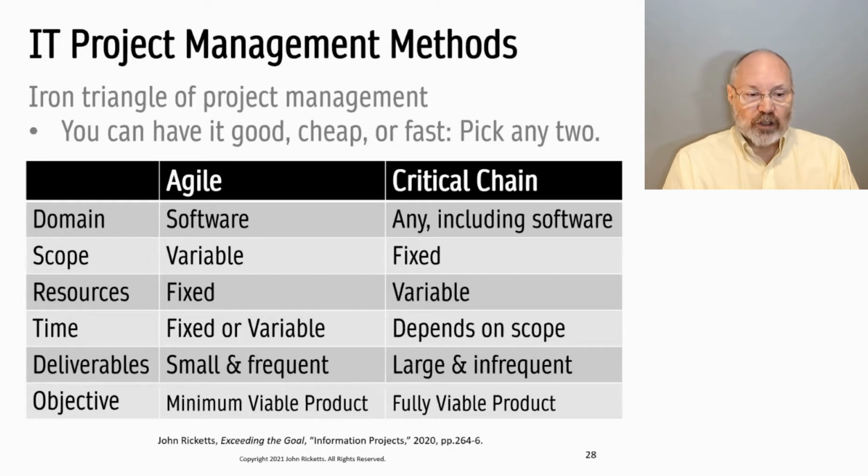So a 2-week sprint on an Agile project might deliver a lot of work in sprint number 1 and less work in sprint number 2 because sprint number 2 involves something really, really complicated. It looks smaller, but it was complicated. And so sprint 1 might deliver an app or two, and the following sprint might deliver just a database.